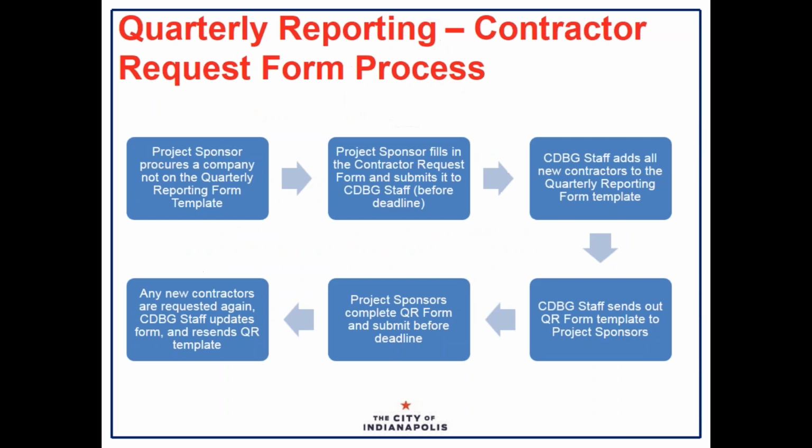All right, quarterly reporting. We're going to start off with the contractor request form process. If you are working with a contractor that is not already in our system, you can see on the first rectangle there, the project sponsor procures a company not currently on the quarterly reporting form template. You will fill in a contractor request form and submit it to CDBG staff before the deadline, specifically the contractor request form deadline, not the quarterly report form deadline.